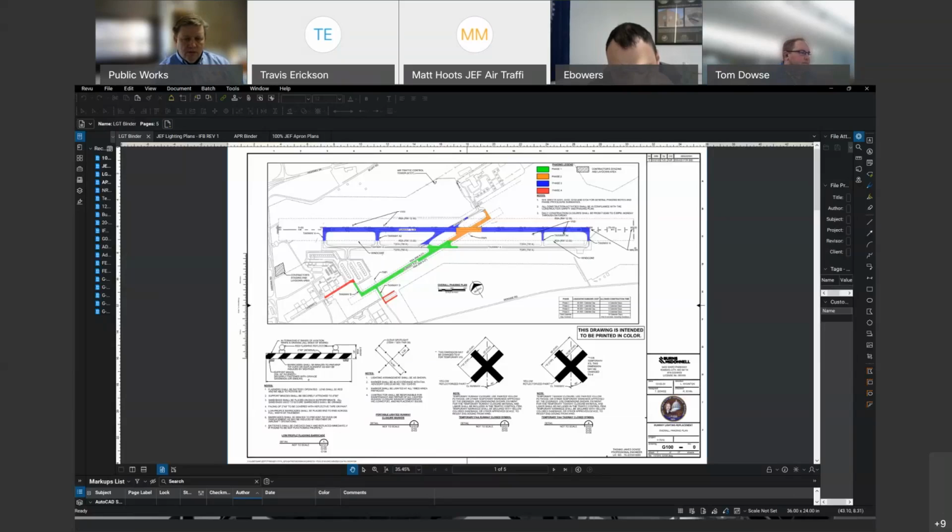Okay. Thank you. And as Tom said, the procurement schedule is going to be running the timeline for this project. And we are meeting with the contractor tomorrow on a pre-construction conference, so we'll have more information then. But again, it's still going to be estimates. Procurement has really gotten messed up with COVID as well. These are long lead items to begin with, but you throw COVID in it, it really gets crazy. So Eric will be updating the tenants through email as we go forward with this project and get a little bit more honed in on those schedules.